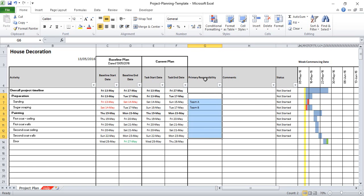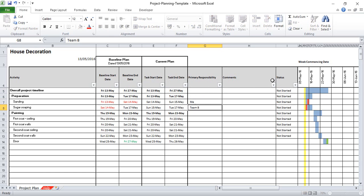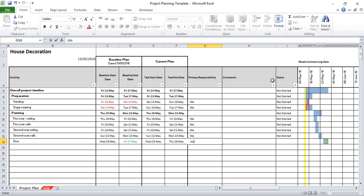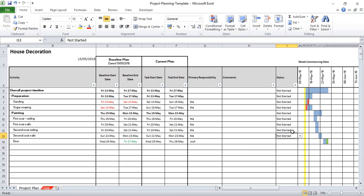This column here — primary responsibility — is really for you to say which team member or which person is going to do the work. So I'm going to assign myself to sanding, sugar soaping, first coat ceiling, first coat walls, second coat ceiling, and second coat walls. The reason I finished the door task earlier was because I'm going to get my nephew Josh in to help, and he's really good at doors.